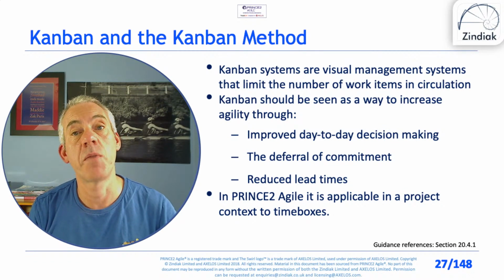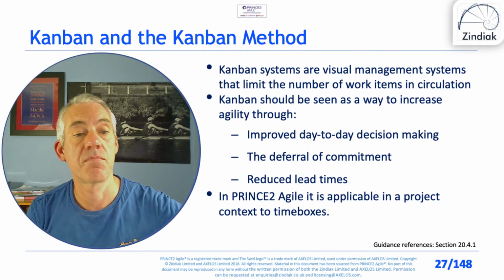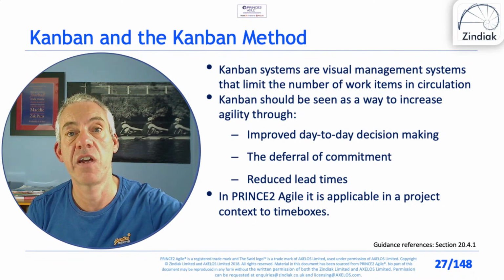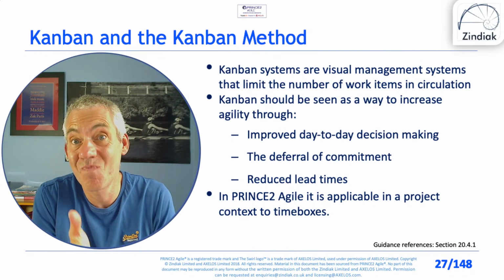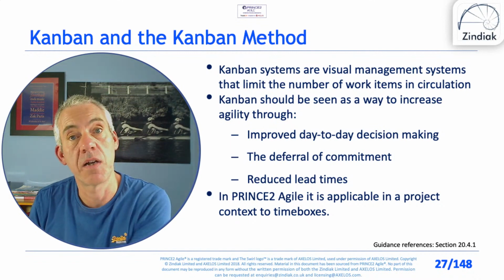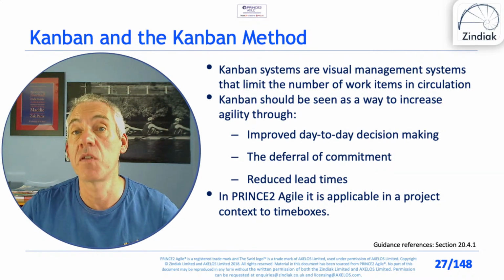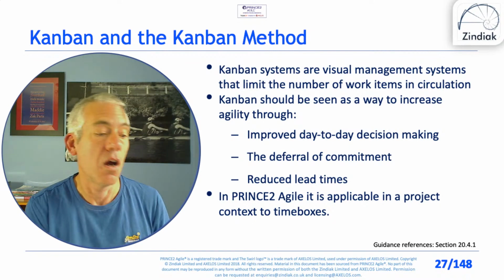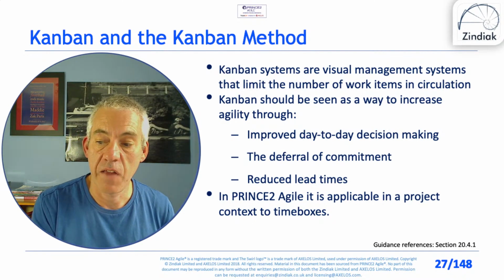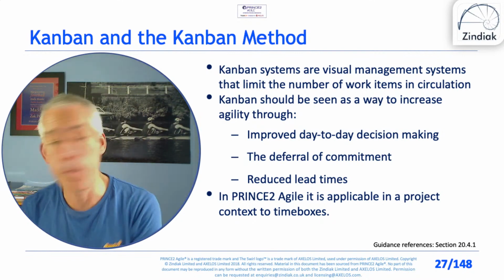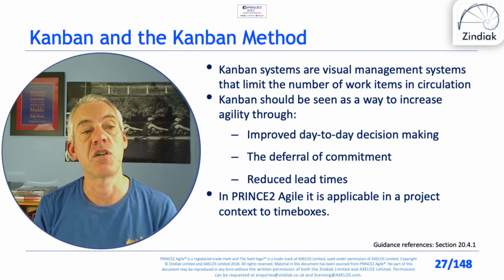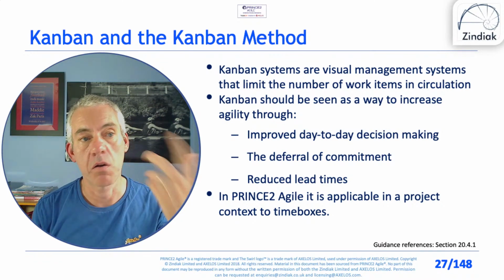If it's longer than 5 minutes, if I've sent something to someone else to review and it's going to take them a couple of days to review, and I can't do anything until they've reviewed on that particular work item, I need something else to do. So we do need multiple things to do, but not so many that you get into task switching, which is, I'm working on this, but I haven't done anything on that yet, so better do something on that, better do something on that, and that becomes inefficient. So limiting work in progress helps with that.